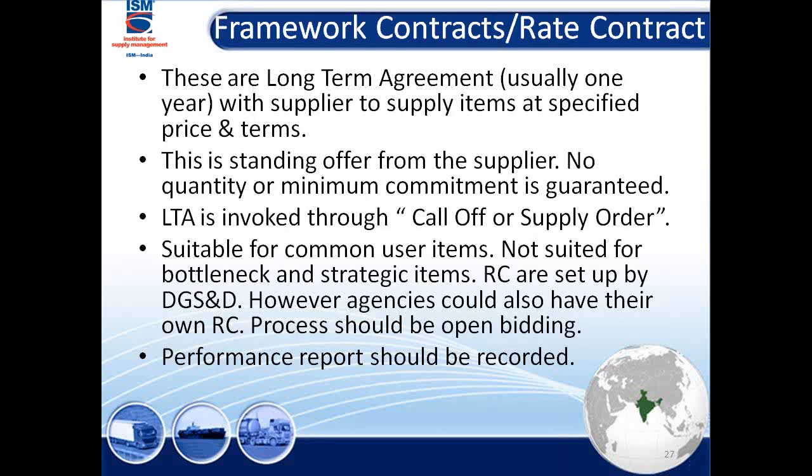So the same framework agreement, now from the graph I'm trying to explain it this way. These are long-term agreements, usually for 1 year. To me, 1 year is very short, personal opinion. But I know you are all stuck with your own rules and regulations. While in the UN bodies, we were allowing 2 years initially, but this could be extended up to a 3rd year, depending on performance. The reason being, sometimes identifying a supplier to make an agreement takes 6 months, and then after 1 year you are again going back to the same role. I think it needs change.